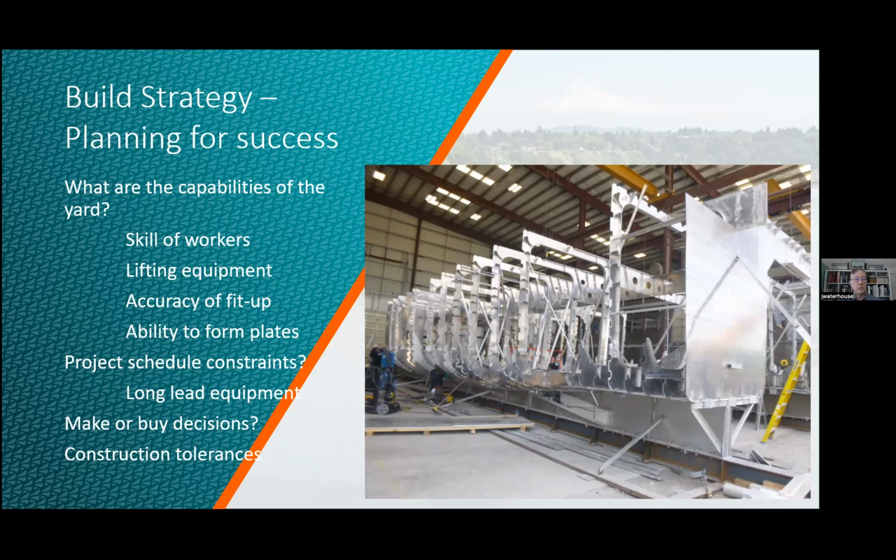I've mentioned make or buy decisions. Do you yourself manufacture the mast, or is that a component that you can have a subcontractor put together for you, so it doesn't take up your yard space, workers, and resources? So a good build strategy is holistic with all the parts of pulling a vessel together. It understands tying into schedule and resources, and your cash flow can often dictate your build schedule. Can you rent equipment to get things done that you may not need all the time? Things like man lifts, even up to dry docks, are part of the question of your build strategy.